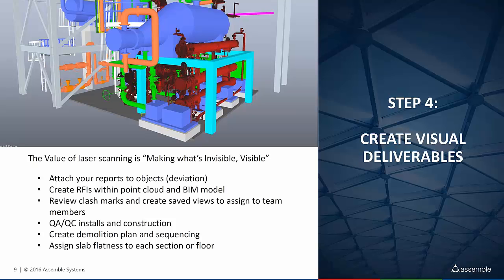You can create an RFI with the point cloud and BIM model directly. If there is a problem with clashes, installs, or a concrete pour, you can right there create an RFI and share it with the design team, subcontractors, or crew members. QA/QC of installs is another type of visual data you can now have with point cloud and BIM together. All of these create visual reports that enable project managers, owners, and field engineers to do their jobs much better than before.